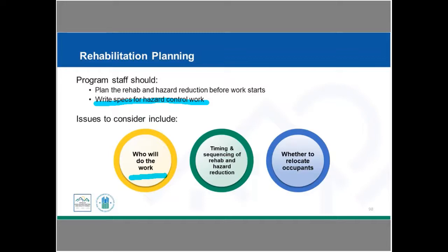And so thinking about what's my plan on this, particularly if I was working in a multifamily project where I had identified that I had some standard components throughout that structure that were going to include lead, I might simply bring in a lead hazard control or abatement contractor, have them do that work, and as they completed that, be turning over then those units to the general contractor. I think more commonly in single-family rehabilitation, we're probably going to seek contractors that have the appropriate certification to be able to complete not only the general rehabilitation, but also the hazard reduction work.